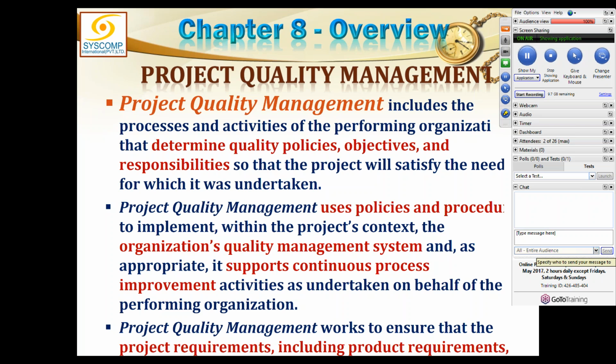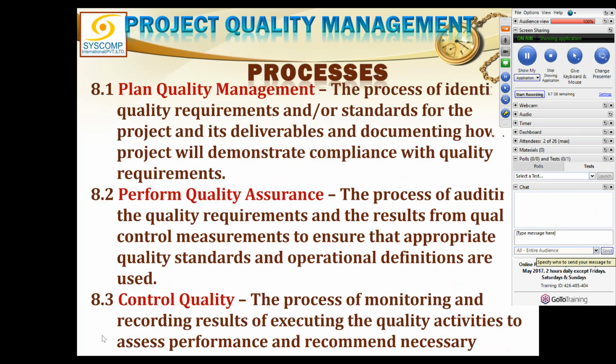It goes through the user acceptance in validate scope, and after it has been validated, it becomes an accepted deliverable. Now it is no more to be checked. It is just to be handed over to the customer ultimately. So after the validated deliverable or the accepted deliverable, there is no more work to be done. So these three processes I just talked about.